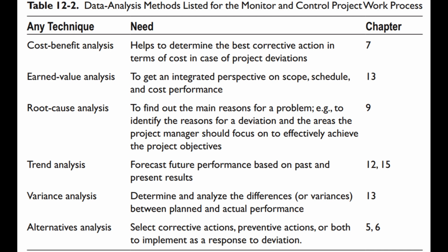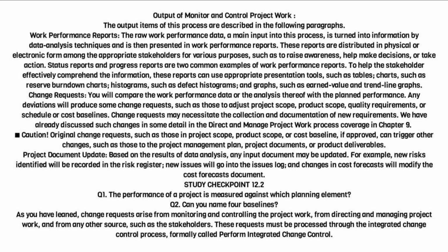Variance analysis to determine and analyze the differences, or variances, between planned and actual performance. Alternatives analysis. Select corrective actions, preventive actions, or both, to implement as a response to deviation. Output of monitor and control project work.